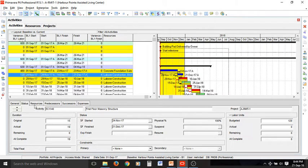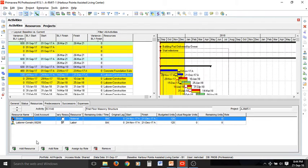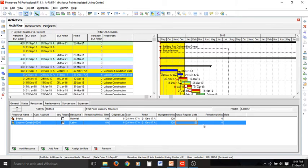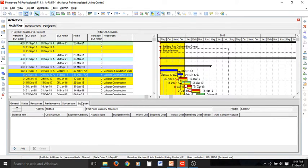We can also change the resources and update any resources that have been used. For example, this labor resource has 8 hours per day for 120 laborers. The actual units can be defined here — we have used all the resources, so the remaining resources will be zero for this activity. The same applies for expenses; you can add any expense if needed.